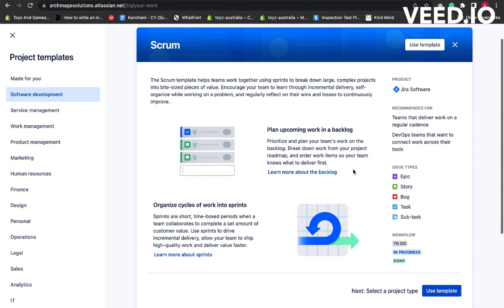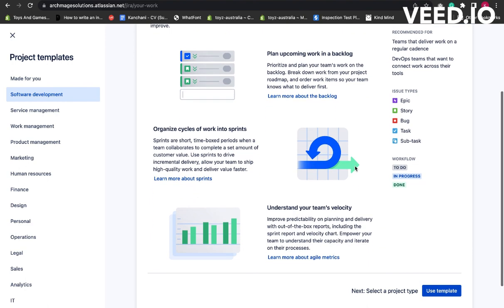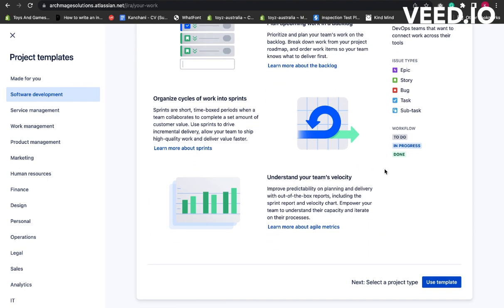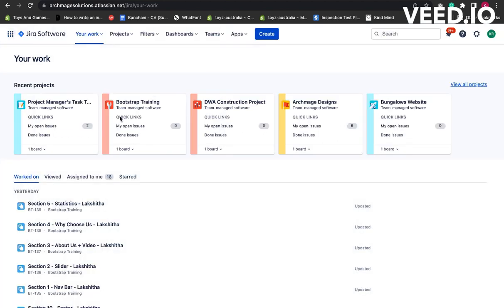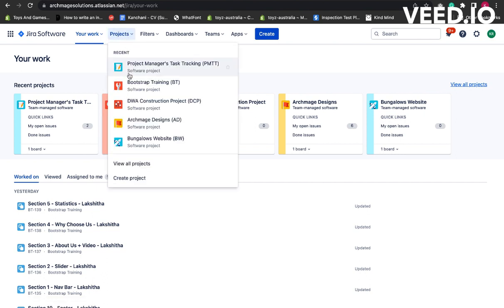The big difference is things in Kanban are done when they're done, while Scrum uses sprints to break down the work, creating a much more predictable environment. Kanban is better suited to long-term projects requiring multiple changes while retaining a stable priority. Now, let's check how we track our time logs for each task in the project.